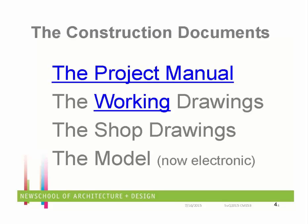Those kinds of decisions can be made in a design build situation, where the architect might say, I want the brass one, so he draws them all in brass. Everybody bids it, the price comes in high, and it isn't until they go back through value engineering and waste time that they find there's a place where the owner didn't care whether they were brass or chrome. So it was the architect's selection, and because of that selection, which wasn't informed by cost but by visual preference, it can affect the overall cost of the project. It's one of the great reasons why designing in a design build situation really helps an architect become more familiar with the values of the decisions they're making.